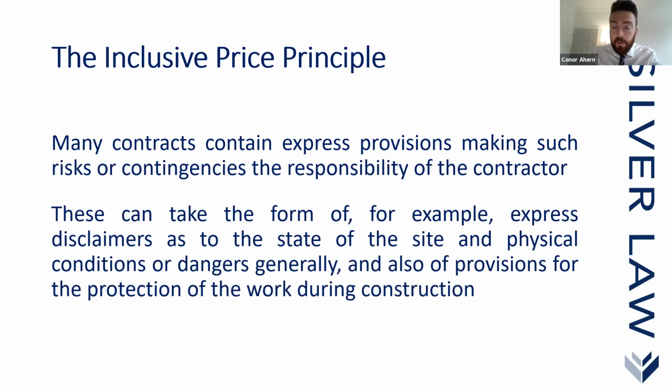Now, this is very important actually in relation to the area of ground conditions. I suppose most design and build contracts will actually state a position in relation to ground conditions. NEC actually has stated a position in the compensation events. Obviously, JCT is silent on ground conditions, hence why you see a lot of JCT schedules of amendments actually directly deal with the ground conditions.